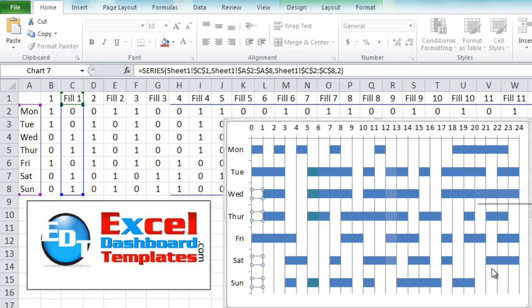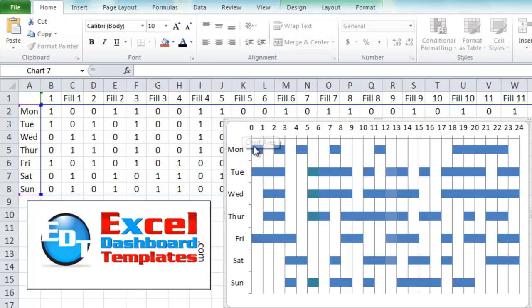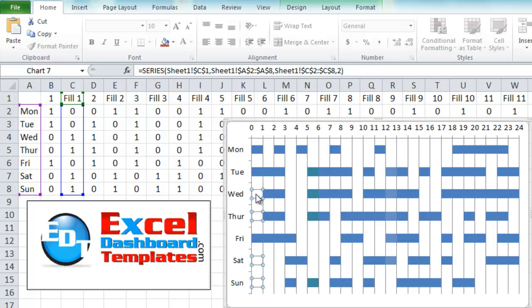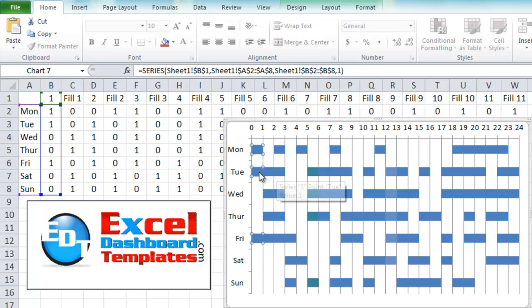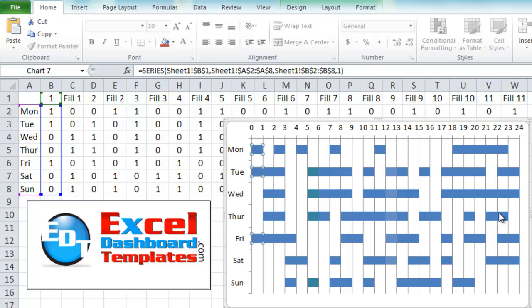You can see how you can make your own time-based Gantt chart just using zeros and ones with a simple if formula. Make sure that you have a series for the amount when it actually does happen, and then you have an alternate series equal to one where it does not happen. Make these fill to no fill and make these all the same color where they're actually the fill series. So every hour has two different series. Hope this helps you make your own time-based Gantt chart so that you can show how time is worked throughout the day.